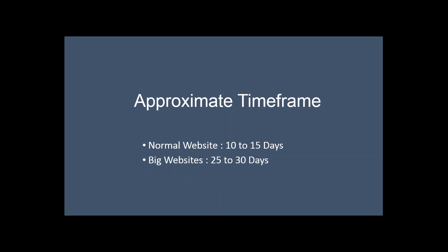So as I said, if you are selling website designing, a 5-page website or 5 Zapdeal pages, 10 to 15 days. Big website, huge website, 30 days or so. That is the approximate time frame I follow. Creating Zapdeal pages is not different. So if you are doing 20 Zapdeal pages or 15 Zapdeal pages, yes, 25 to 30 days, if they want everything at a time. If just 5, then yes, 10 to 15 days. That is the time frame.